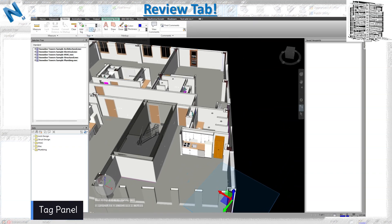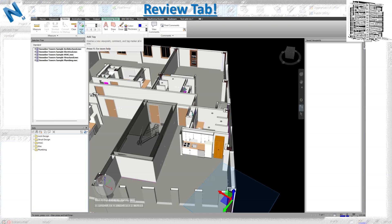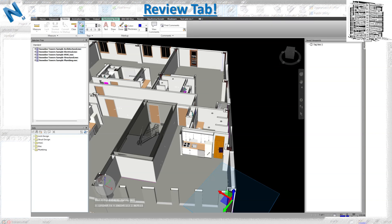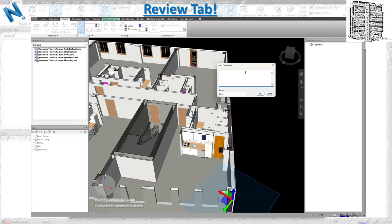Next is the Tags panel, which is great for creating a punch list in Navis Works. You can add views, comments, and dates, and export everything. When you click to add a tag, it opens a comment dialog. You already have a viewpoint, and you can add notes with a status of New, Active, Result, or Reviewed. Every tag you create stays in the viewpoint with all associated comments.